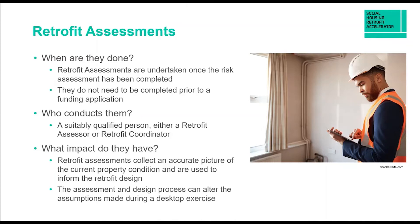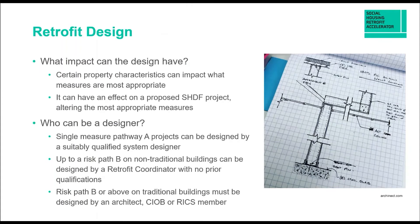Retrofit assessments collect an accurate picture of the current property condition and are used to inform the retrofit design. The assessment and design process can alter assumptions made during a desktop exercise — you may have EPC information and have modelled through various software tools, but once on site there may be unexpected conditions that mean the project has to be adjusted. When it goes through the design stage, the retrofit designer will propose the right measures for the right property at the right time, and design itself can have an impact on your retrofit programme.